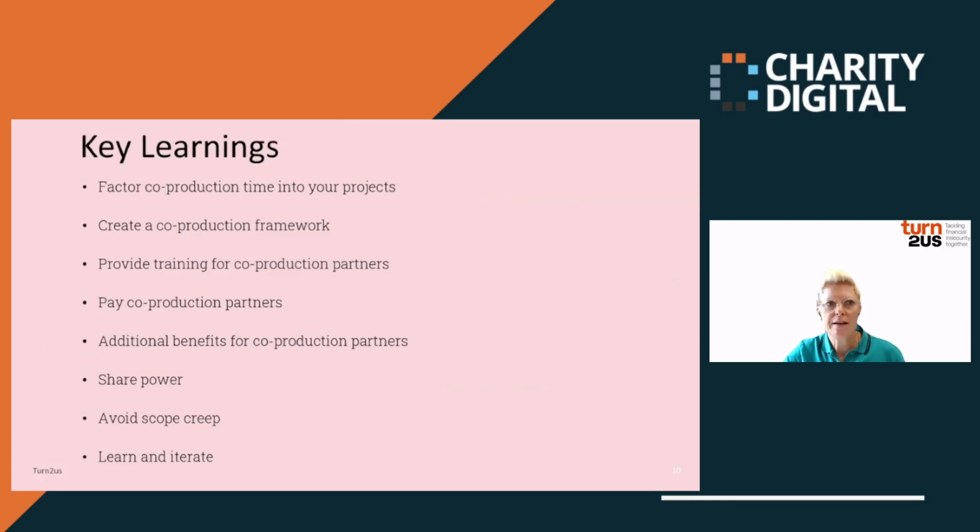So some key learnings that we've gained over the last 5 years. So make sure you factor co-production into your timelines. It really does take time, but it is time well spent. And so you need to invest in time from the beginning because it takes time to recruit people, takes time for everyone to get up to speed on what co-production actually is, and also takes time to build a functioning team where people feel safe to contribute. And also takes time to investigate and respond to all the great ideas that come out of these co-production sessions.